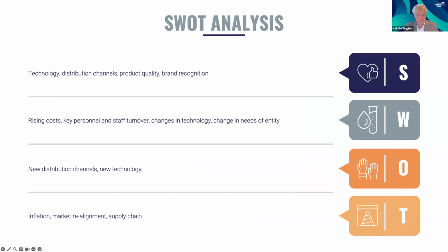If you're familiar with SWOT, strengths, weaknesses, opportunities, and threats, I also advocate for doing a SWOT analysis. If you're going to take the opportunity to build an ERM, an enterprise risk management program, even in a small footprint, use a SWOT analysis where you look at a contract. What are its strengths? What are its weaknesses? What are the opportunities and what are the threats? You look at it in that manner, and you may very well identify risks that you may not have even thought of.